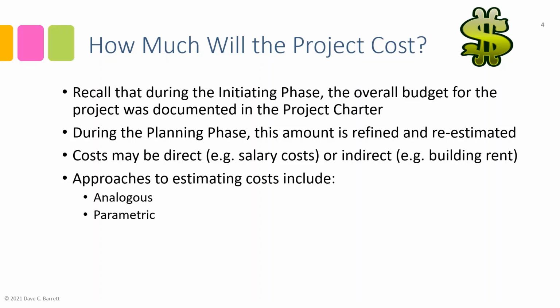And so what you need to do then is calculate the number of square feet you have to do, plus a little bit of extra wastage and so on. There's cuts and a little extra you'll need, and then multiply that by $5, and that gives you your estimated cost for those materials. So it's a way of doing that.